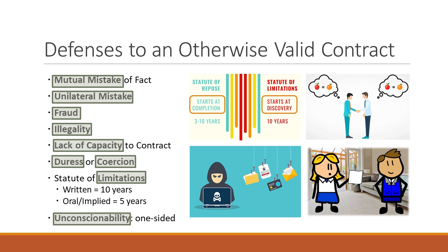So in Illinois, with the 10 and 4, it potentially could be 14 years after the project is completed before you as the contractor or the architect could get sued. So that's much longer than the 10 years that's up above.